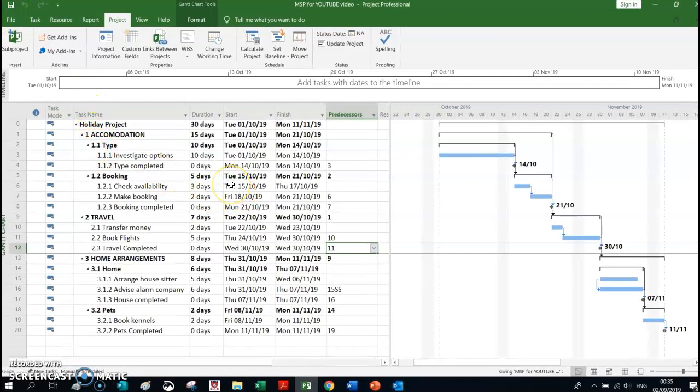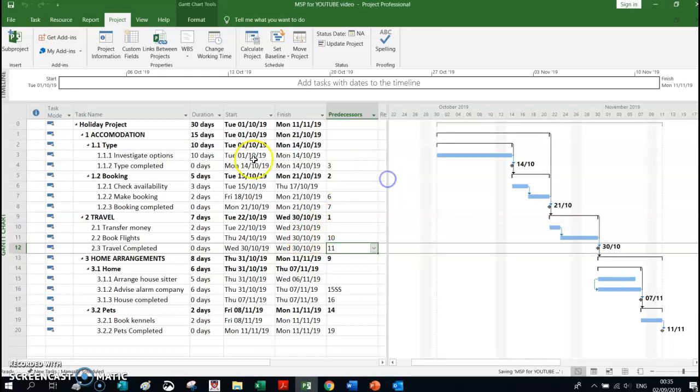And the last thing I need to do is to show you how to print this. Printing's a little bit tricky if you're not familiar with it. So when everything looks pretty and your columns are automatically widened, you can think about printing. Now the thing with printing in Microsoft Project is that everything to the left of the split bar, in terms of what is going to appear in the columns, every full column will be shown on the printout.